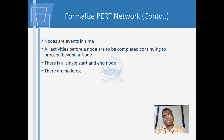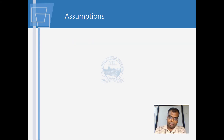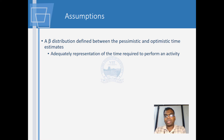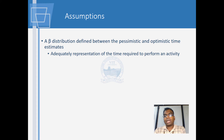There is always a single start and a single end, and there should not be any loops — it is the same as in CPM. Here are the assumptions which make PERT different. We find that it uses a beta distribution between the pessimistic and optimistic time to represent the time required for each activity. We still need realism in the values of the optimistic and pessimistic times.